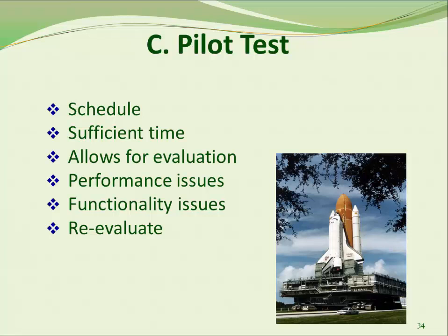The pilot should allow sufficient time to fully test the system. If you schedule a short pilot, only a couple of weeks, with no time afterwards for evaluation or to correct final issues with performance or functionality, then it is not a pilot. It is just the first stage of rollout. Be prepared to do it right. Remember, the rollout date is written on a piece of paper, not in stone. You will need adequate time to reevaluate any changes you may have made and perhaps retest before you present the results of pilot to FNS.